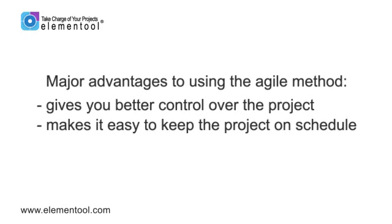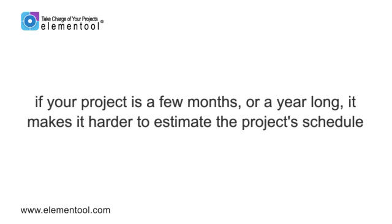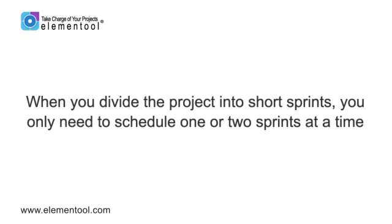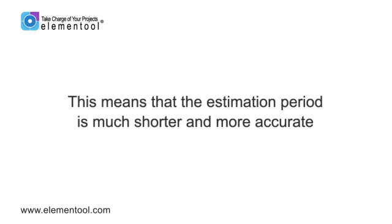It makes it easy to keep the project on schedule. If your project is a few months or a year long, it makes it harder to estimate the project's schedule. Who can predict what might happen six months from now? When you divide the project into short sprints, you only need to schedule one or two sprints at a time. This means that the estimation period is much shorter and more accurate.